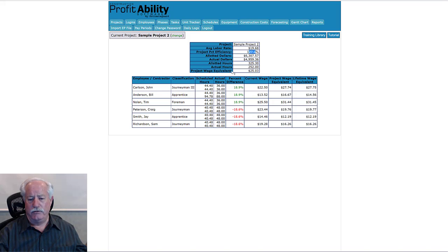Your project wage equivalent was $25.03 an hour. So even though your average labor rate is $19.68, your crews are operating at a level of $25.03 an hour. So this is a very good report right here. It's early on in the project, but things are trending very well so far.